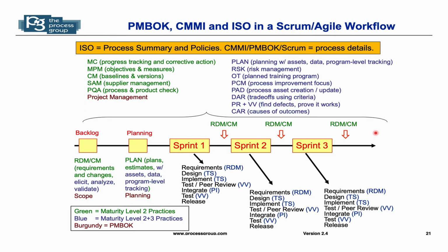I would recommend you start with the framework you want. For example, in the middle here, I put the typical steps of an Agile Scrum project. They have a backlog where they derive their requirements, user stories. They do planning, which could be like planning poker, setting dates on sprints, and determining a definition of done for the iteration. And the sprints where they go through activities to do the work and end up with a test and a demonstration to the end user to get feedback.